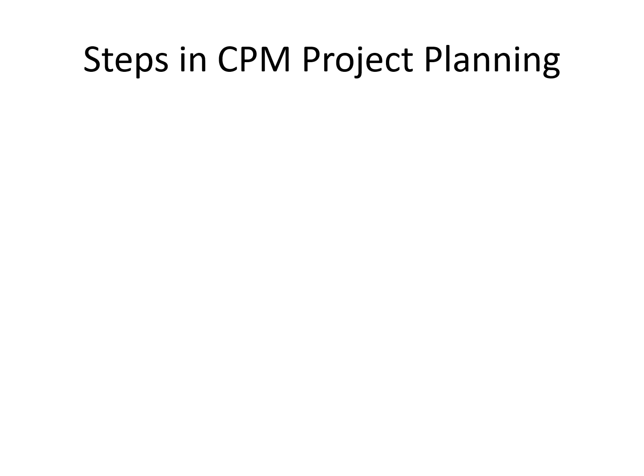Let's look at the steps in creating your critical path. From the work breakdown structure, a listing can be made of all the activities in the project. This listing can be used as a basis for adding sequence and duration information in later steps. Some activities are dependent on the completion of others. A listing of immediate dependencies of each activity is useful in constructing the critical path or CPM network diagram.